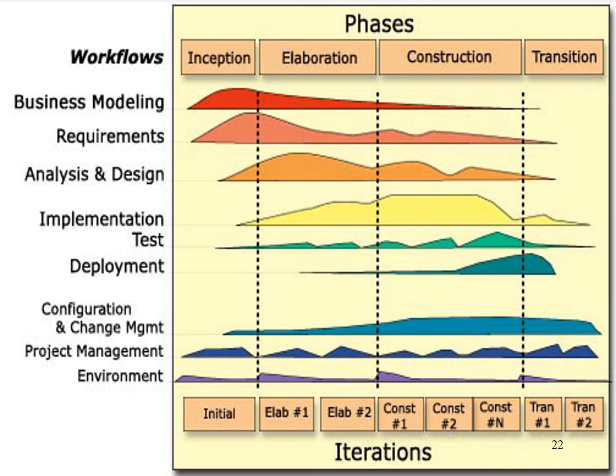Okay, how do you read this diagram? RUP is done in a cycle manner, an iteration manner. So this is the initial cycle. This is the second cycle of elaboration. This is the first cycle of elaboration. This is the second elaboration cycle, and then this is a construction cycle. There are three cycles, no more than three, and then transition. Transition is when you deliver it to your user. Okay, how do you read this?